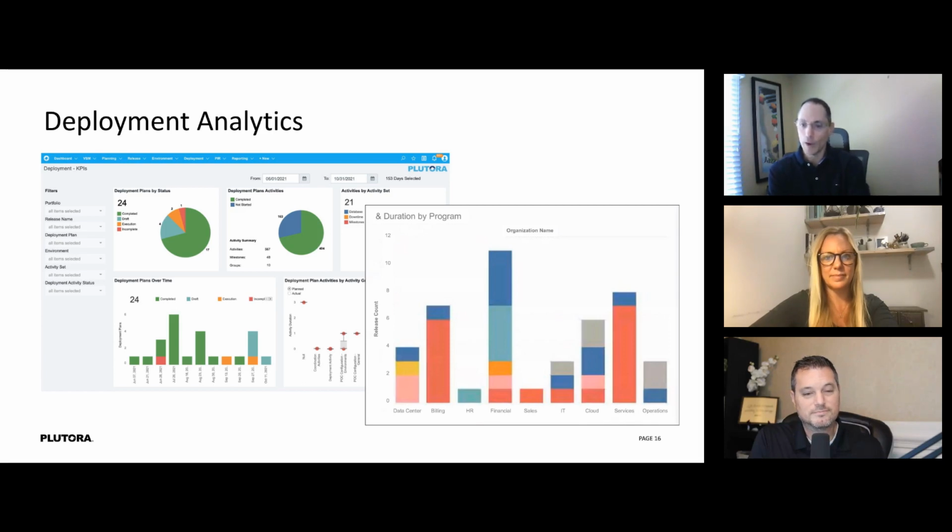Because, well, why can't I come into the release? Well, my history shows that we're going to double our risk of incidents by you coming in at this point in the life cycle. It's too late. Our risk is too high.